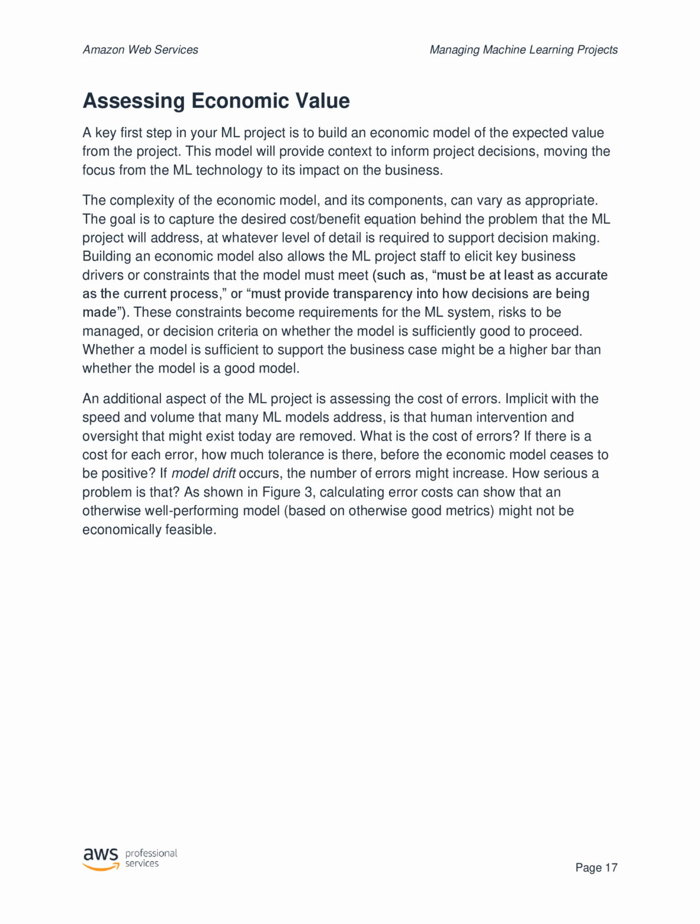Building an economic model also allows the ML project staff to elicit key business drivers or constraints that the model must meet, such as, must be at least as accurate as the current process, or must provide transparency into how decisions are being made. These constraints become requirements for the ML system, risks to be managed, or decision criteria on whether the model is sufficiently good to proceed. Whether a model is sufficient to support the business case might be a higher bar than whether the model is a good model.